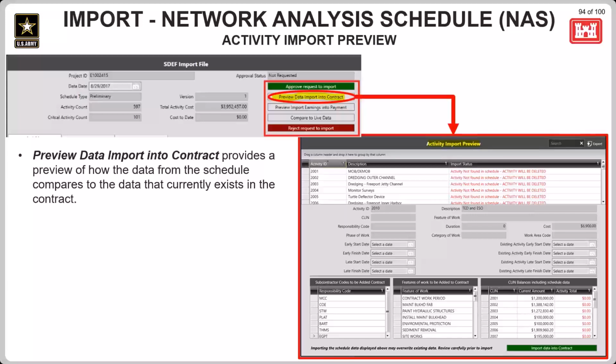The approver will really want to pay close attention to any red text that appears on the screen, as that usually indicates a major change, which could result in deletions, duplicates, or missing links to cleanse. These changes may be intentional, but they will want to communicate with the contractor to make absolutely sure.